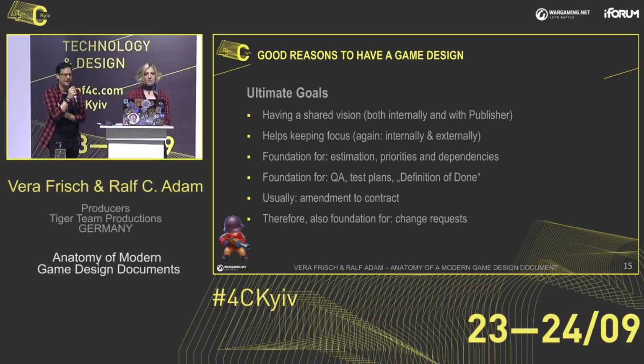This is also true for the next point, the change requests. Like I said before, if you design something, there will be changes. But if you agree with a publisher at a certain stage, this is what we're going to deliver, this is what we agree to in the contract, and this is the budget, and then changes pop up, especially when the changes come from the publisher, you can say, sure, we can implement that, but it's not what we originally agreed to, so we need more time, and obviously we also need more money.